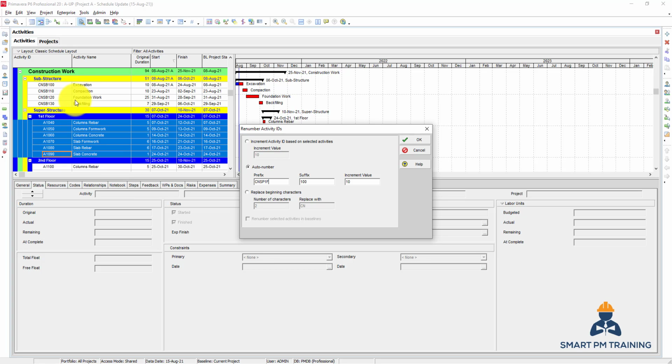6 to 10 maximum. So if I choose here 7 characters, most of the program should be 7 characters. It depends on your decision or your protocol for developing the activity ID. I'm just giving here an example. So maybe it goes beyond the 7 characters, but make it all consistent.